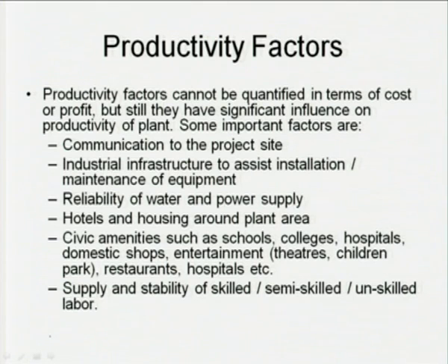Similarly, for water, if the water supply is less than the demand, then you have to go for alternate arrangements such as drilling of bore wells at the site. It is also possible to have an effluent treatment plant for water recycle at the expense of higher capital investment and operating cost. So, water recycle is beneficial in the long run. However, at the beginning it will require higher capital investment.